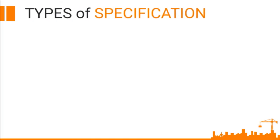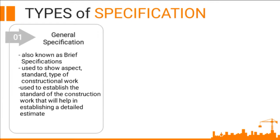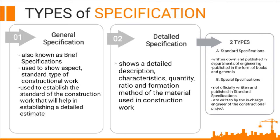Types of specification. The first type is the general specification, also known as brief specifications, used to show aspect, standard, and type of constructional work — used to establish the standard of the construction work that will help in establishing a detailed estimate. The second type is the detailed specification, which shows a detailed description, characteristics, quantity, ratio, and formation method of the material used in construction work. The detailed specification has two types: standard specifications, written down and published in departments of engineering in the form of books and journals; and special specifications, which are not officially published in standard specifications and are written by the in-charge engineer of the constructional project.